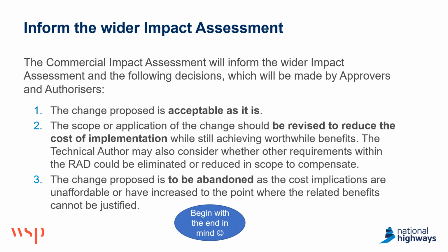And to put it into context, the commercial impact assessment will inform the wider impact assessment and the following decisions that will be made by approvers and authorisers. So maybe the change proposed is acceptable as it is, which is the outcome we all hope for. Or maybe the scope or application of the change should be revised to reduce the cost of implementation while still achieving worthwhile benefits.